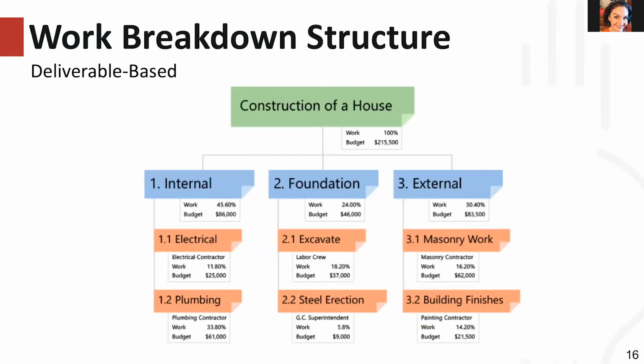Okay, so your project management plan, which can include use of tools like Gantt charts or Trello, is only going to be as good as your understanding of the tasks and activities in your project. So in the field of project management, there's a great technique called work breakdown structure, or WBS. And Project Management Institute defines WBS as a deliverable-oriented hierarchical decomposition of the work to be executed by the project team. So in English, that's just to say that you're breaking down all of the things that a project needs to accomplish into a graphic format.